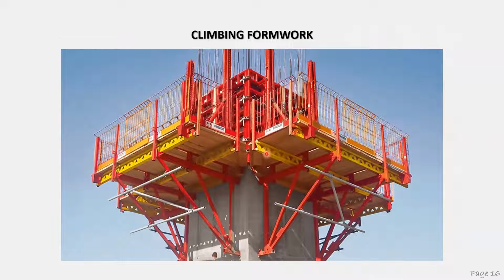The higher the building, the formwork will follow the level of the wall. It can be used for tower construction, much more easily, because you have this climbing formwork, and you may also reduce tower crane usage.